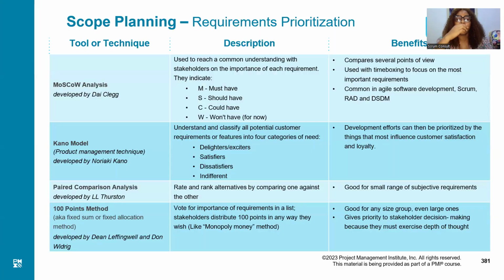Okay, you have here prioritization. Remember we talked about nominal group technique, that when you bring in your requirements, you should be able to prioritize them in terms of value, okay? For the one that has the highest value, you look at the risks associated with the value and maybe the dependencies. We do a lot of prioritization in Agile, not in the predictive, okay? So we have different methods of prioritization. We still do it, but let me just go through it.